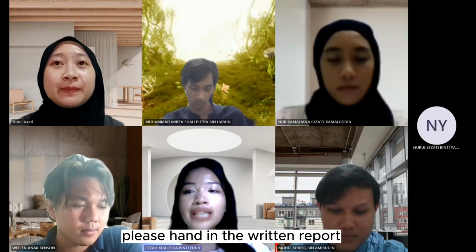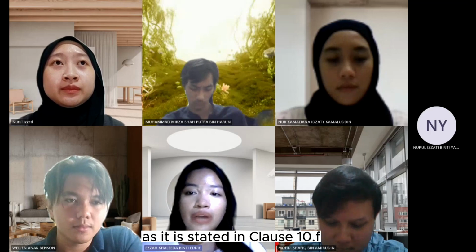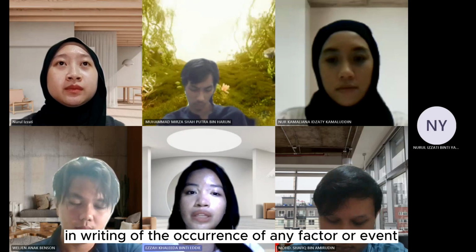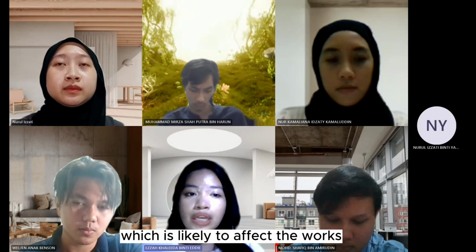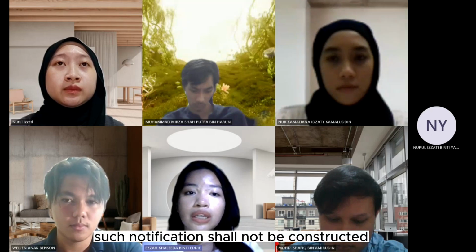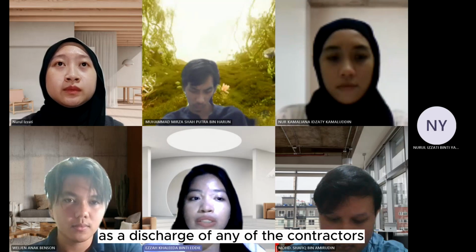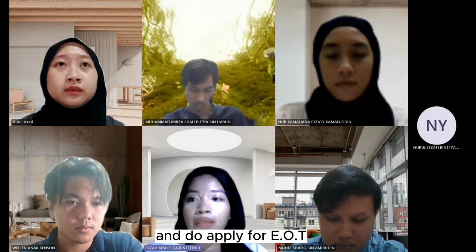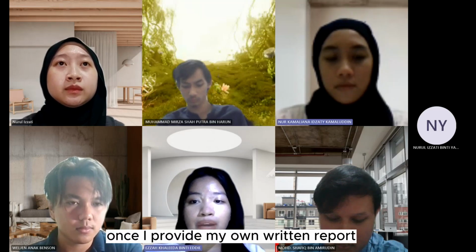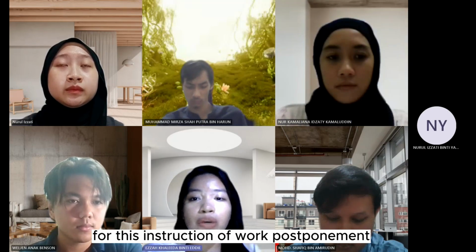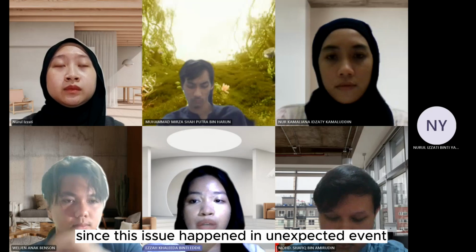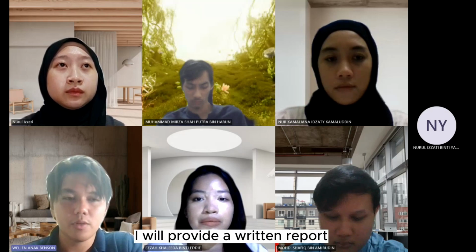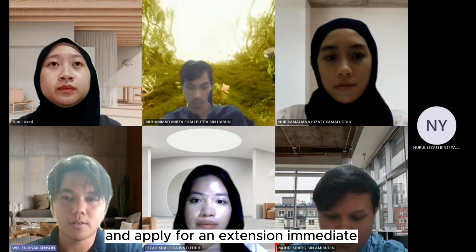For the contractor, please hand in the written report as stated in clause 10.f, which is to inform the government immediately in writing of the occurrence of any factor or event which is likely to affect the works. Such notification shall not be construed as a discharge of any of the contractor's obligations under this contract, and do apply for EOT. I will approve your application once I provide my own written report for this instruction of work postponement investigation, since this issue happened as an unexpected event. Thank you for clarifying. I will provide the written report and apply for an extension immediately.